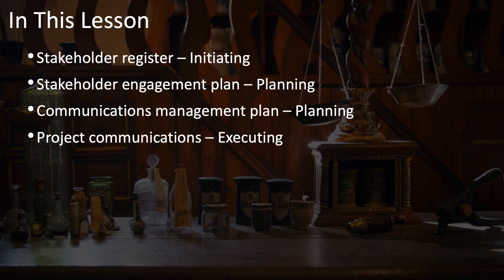And then the actual project communications, which happen during the project executing phase. You'll notice that this list is presented in the order in which these documents are created, which is the order in which we'll cover them. The planning documents — the stakeholder engagement plan and communications management plan — are both part of the project management plan. The other two, the stakeholder register and the project communications, are project documents that are important but not part of the project management plan.